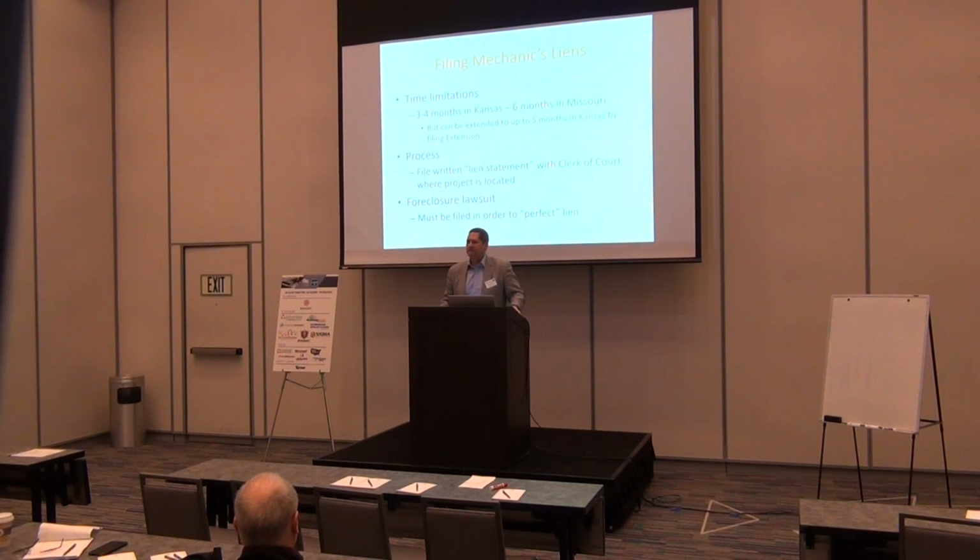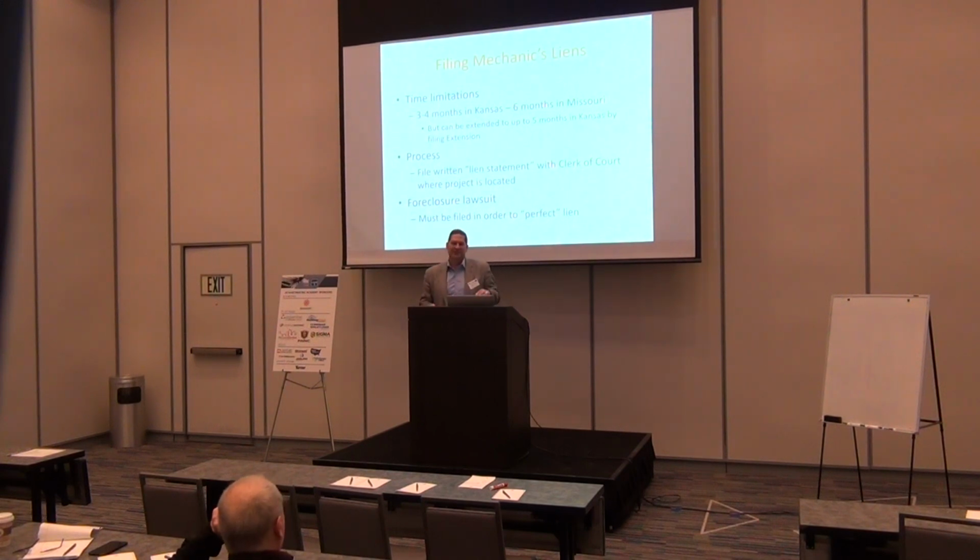What about substantial completion and mobilization? I mean, when I get done with work, it doesn't mean my equipment's off the job. Right. Would you prefer the day that we're working to mobilize it? Would that be when the delivery walks off, or when the boss says they're done? The mechanics lien statutes say within 3 months of your last day of work on the project. So it's really up to the judge to decide what that is. And so what I would always tell you is, if you're the drywall guy, it's the last day on drywall. If you're the electrical guy, it's the last fixture you put up. That's the day you want to use.